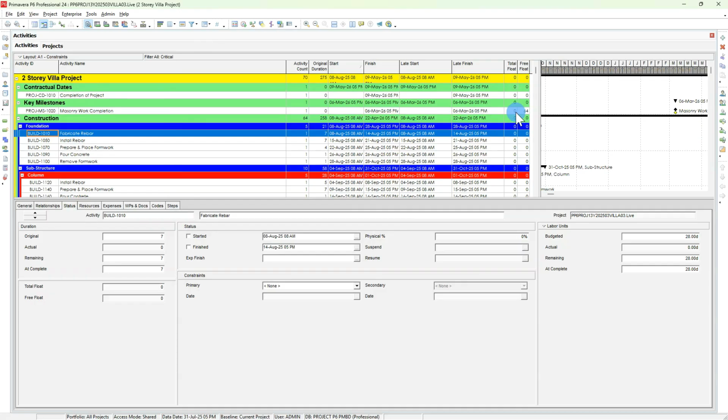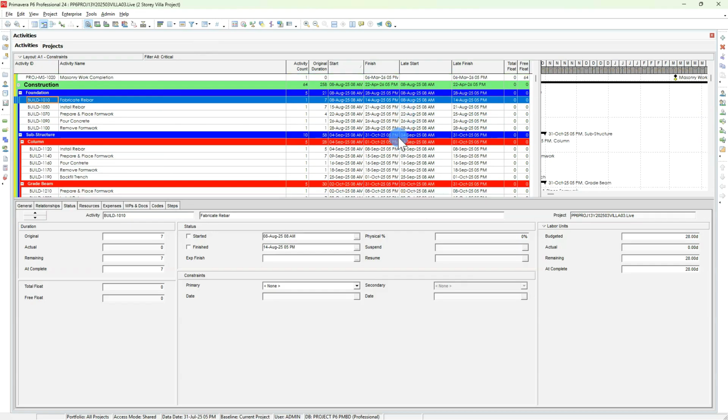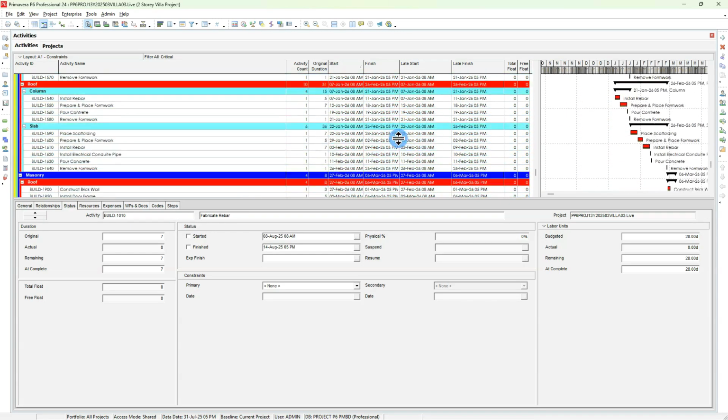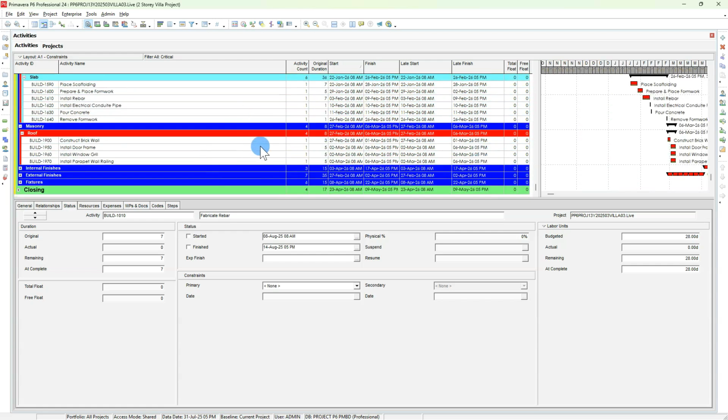You see here now the 8 hour, but that means a full 1 day float task is not on the critical path. You see here only the zero float. Even if you see 1 hour, 2 hours, 3 hours, as it is less than 1 day, it should be on the critical path, but a total float with one full day should not be on the critical path.